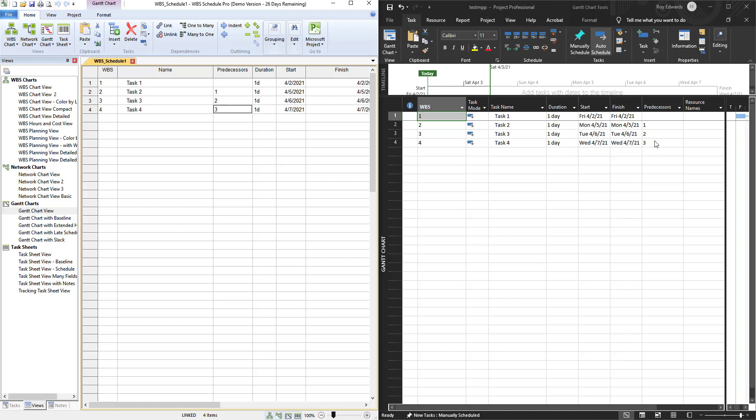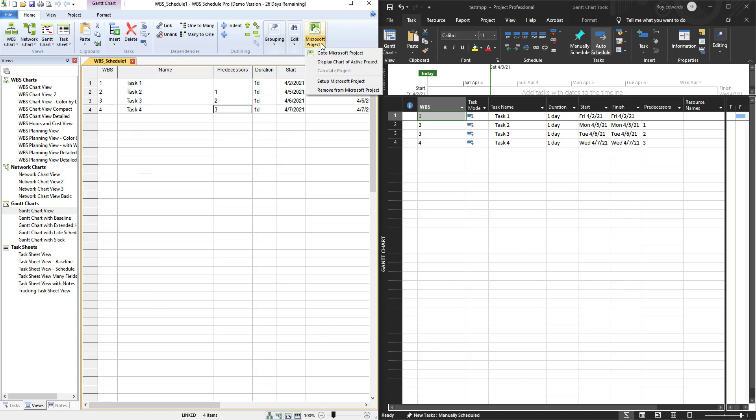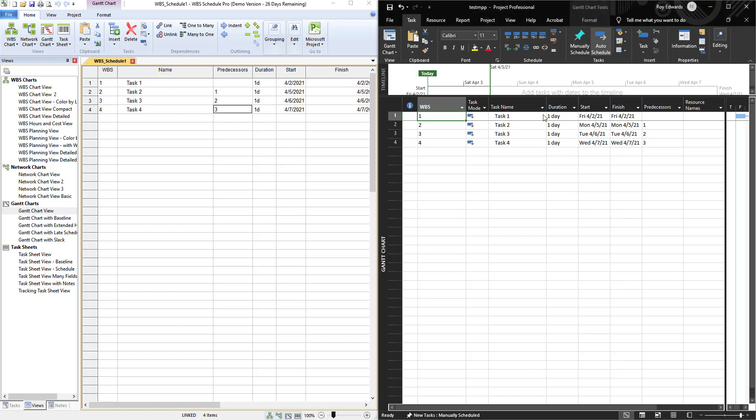The project in Microsoft Project would now be synced to your WBS project. So again when exporting, please use the Gantt chart view in WBS Schedule Pro. Use the export to project or go to Microsoft Project. And then once in Microsoft Project add the WBS field that is already available which contains the breakdown structure of WBS codes available in Microsoft Project.